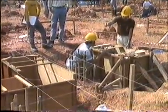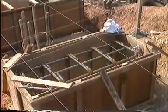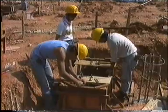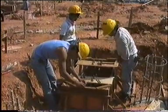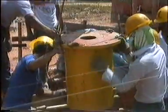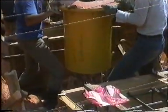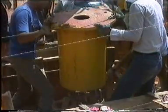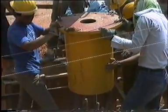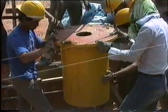On top of the footings, we have to position these anchor bolts. One of our important tasks is to ensure that the bolts are correct in level, position, and alignment, as mistakes here can be very difficult to remedy after concreting. This is the steel pile cap inserted on top of the pile reinforcement. It has to be positioned at exactly the right level.